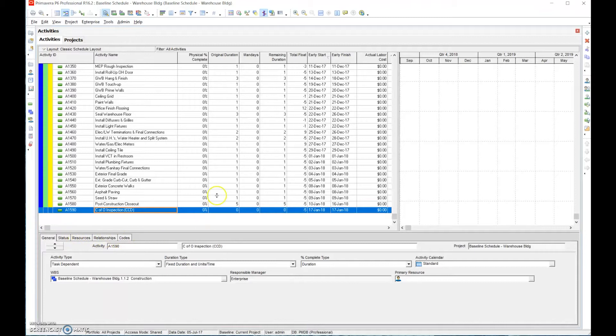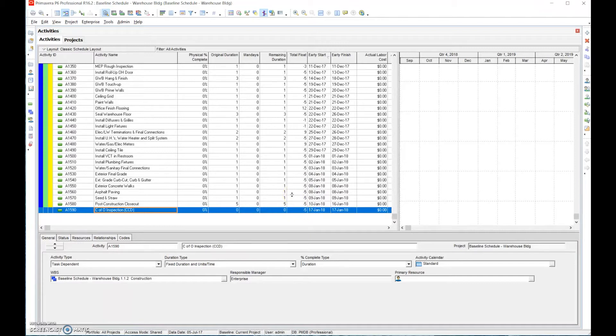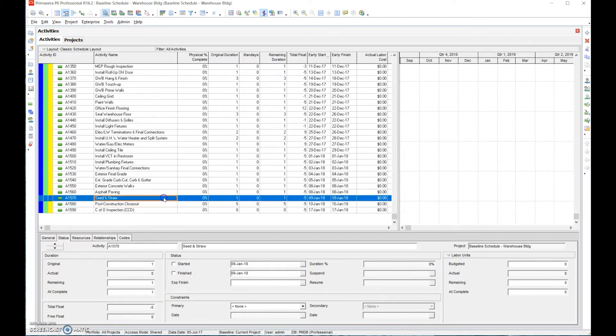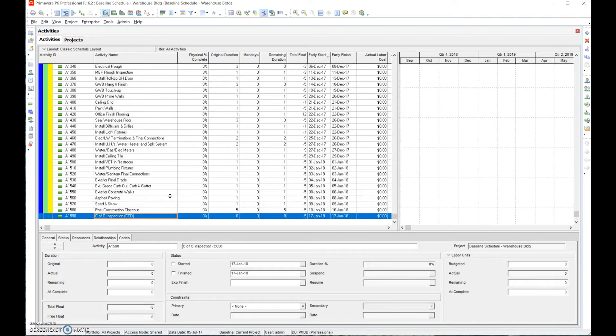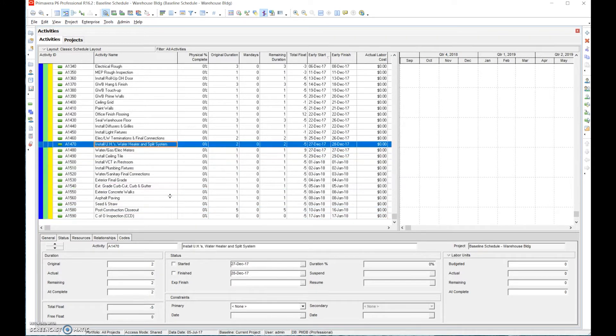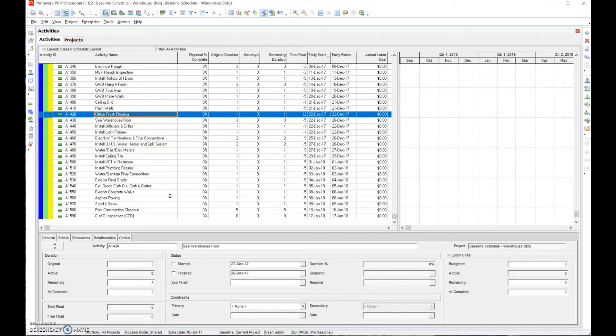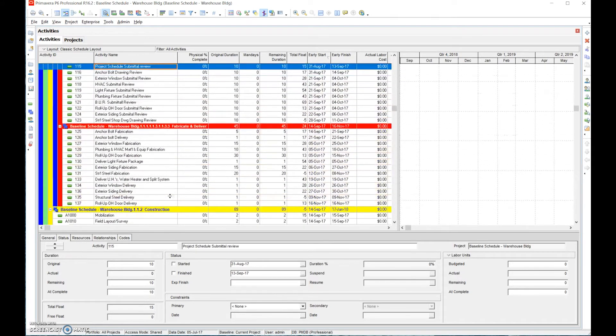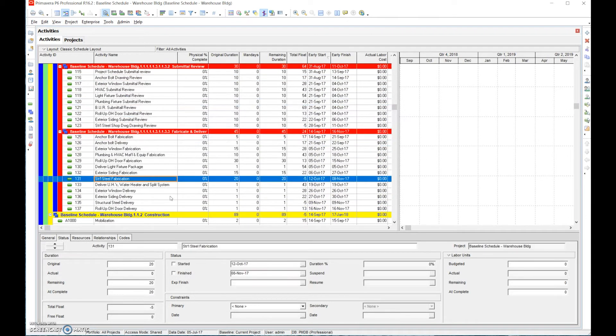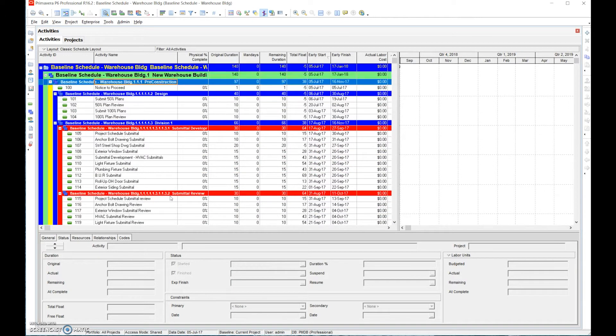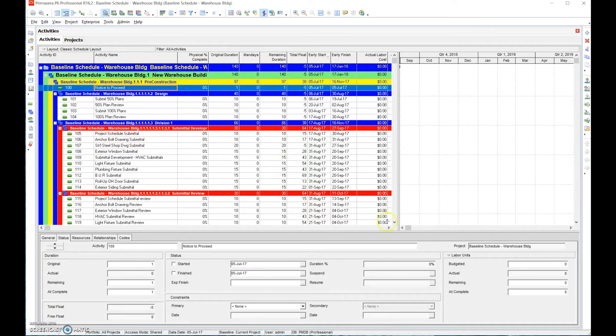So the total float, as I indicated before, the total float is simply a number. It should be zero for critical path. If it's negative, we should never have negative numbers in a baseline schedule. That indicates to us that there's got to be some type of constraint in here. Somebody had some type of constraint listed within here. If we go, we're going to kind of have to go searching back to all the negative numbers and say, okay, well, where's the constraint?